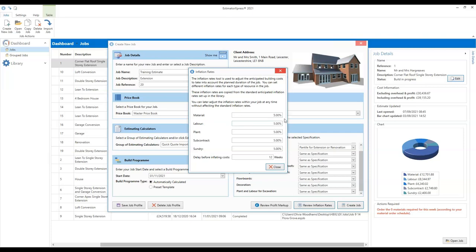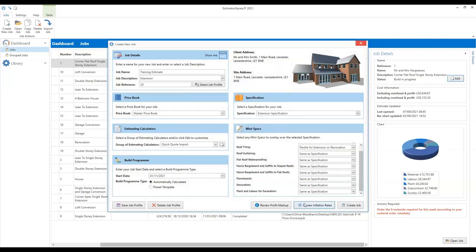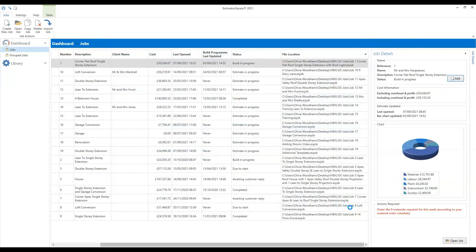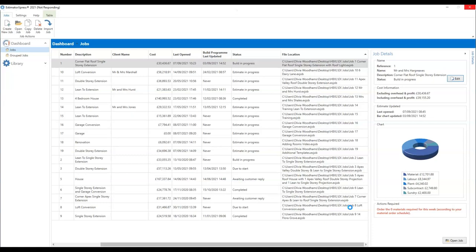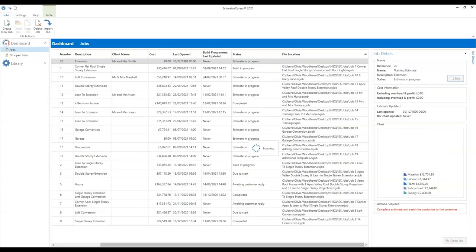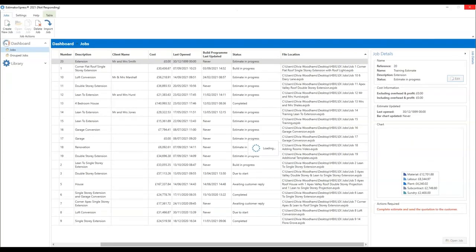What this is doing here is adding 5% onto all of these different costs starting 12 weeks from today. That 5% means 5% over the next 12 months, so it might not actually be high enough — these figures might need tweaking upwards, but this is the software default setting. I'm going to click close for now. Once you've filled all that out, you can click create job and the software will take a few moments to pull together all that information — selecting your chosen specification with all those mini spec resources, and putting together your build program with the start date you selected.